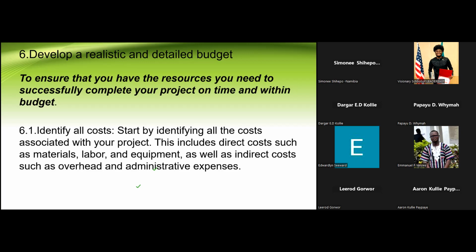So indirect costs as well, like the overheads and so on. Now with the overheads and administrative, overheads are staff and salaries, okay? So overheads and admin expenses, you will decide, are we bringing in new people on board to the project? What are the donor requirements? Or are we adding to the level of effort of the existing staff members? Very important. In one of the organizations that I worked with, we decided that we first look at the eligibility criteria and what the donor says.